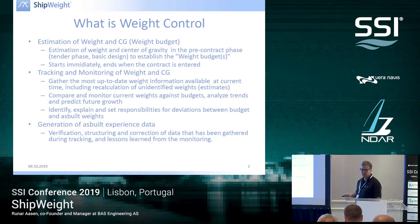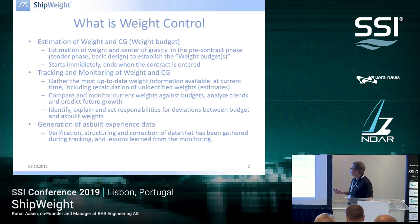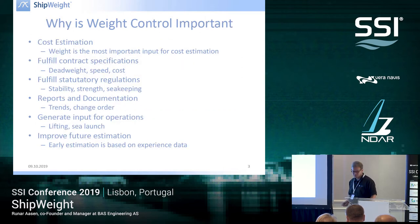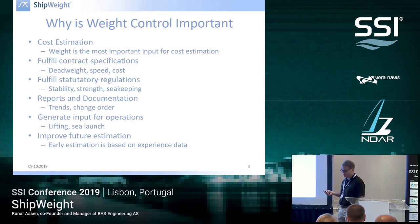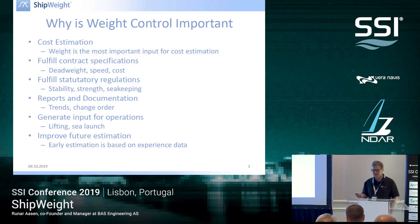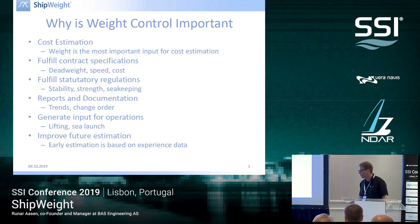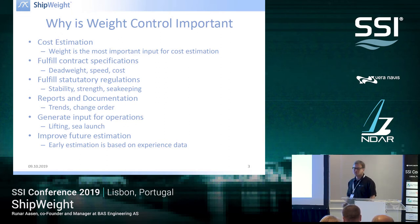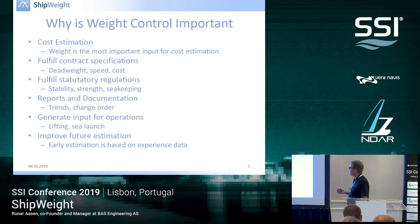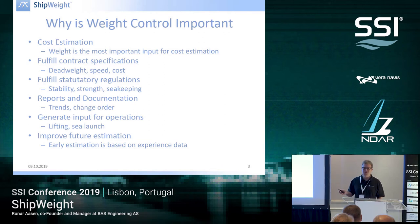So this is how we in our company look at it — this is how we define weight control. And the next obvious question is: why is this important? Cost estimation — weight is the most important input for a cost estimation. So if you think cost is important, weight is important.